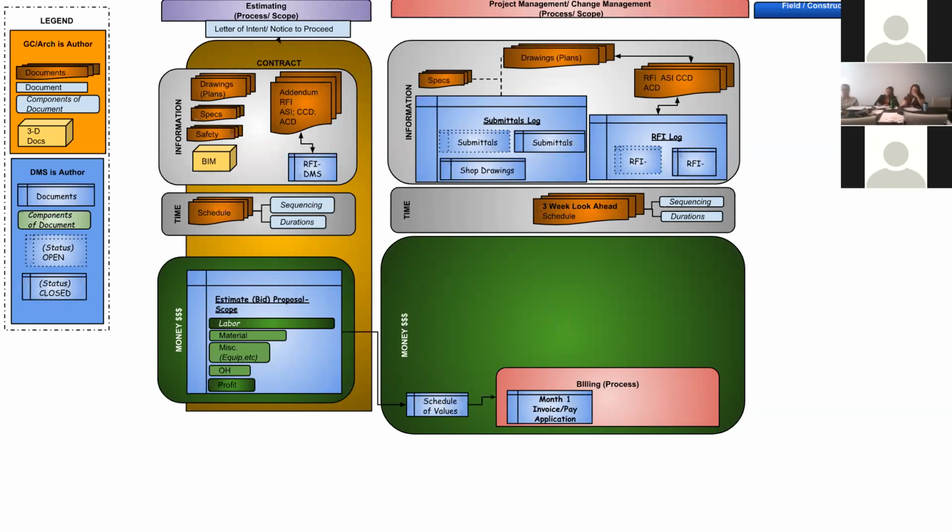Now, I'm going to bring up something, it's an advanced component of management. Senior project managers would be able to do this: looking at your billing and comparing it to your 3-week look ahead schedule and to your master schedule, it allows us to give leverage for any delays. An example of that would be Delta. The Delta project, when we're submitting what percent we are complete to ask for how much money we want to receive in a month, we look at the schedules and see that we're behind or delayed compared to